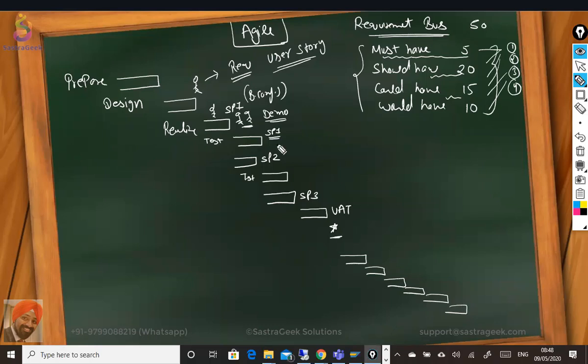So what happened in here, all the places the business user is involved. He has given the requirement and then the demos have been given to him, 2 demos a week. As soon as a sprint is completed, the system is given to him so that he can do some hands-on and some testing. Even in this design phase, we are giving system access to business so that he would be able to see the standard with the best practice.